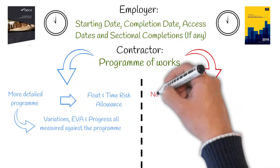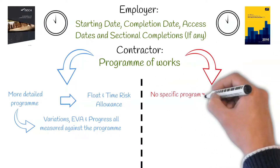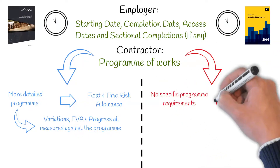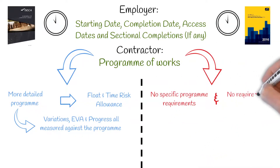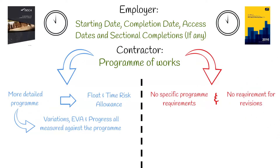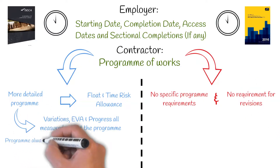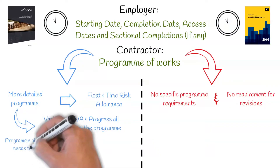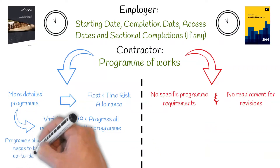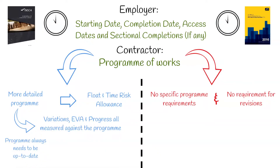The JCT doesn't stipulate what the program should show and there are no requirements for revisions to be submitted. Under the NEC, it is imperative that there is always an up-to-date accepted program in place to ensure the contract runs smoothly.